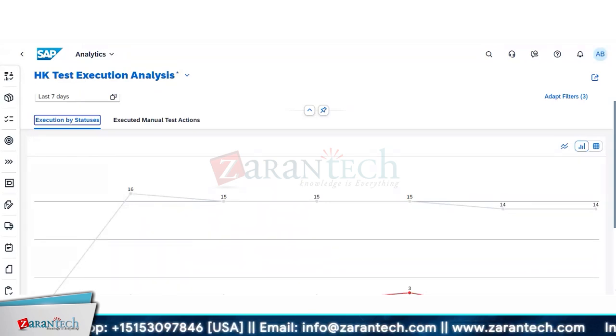Even if we don't take individual, even if it is going to run as test plan only, you have three iterations, so it is 40 times 3, 120 steps. You are not going to run it as part of one test plan and reuse the same result. Once test plan one is done, you run it again as part of the second test plan, and again for the third. The same test case, but used in different test plans, contributes 120 steps to your total count. In that way it helps.